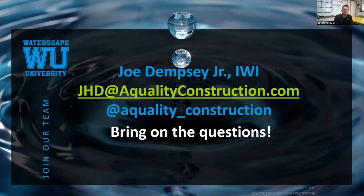Since you guys self-perform most of your work, how difficult are jobs like this to take on when it takes up so many resources? We're booked out basically 12 months in advance all the time. So my biggest thing is controlled growth. We never over promise. We try not to oversell. But when I know I'm going to build this pool, then I basically just block out 6 weeks for the majority of our company. We have guys that specialize just in plumbing. We have guys that just do our tile. We have two crews that just do front end, and both of our front end crews come together for this one. And if there's no tile to do, no plumbing to do, our two managers in both of those areas could also run a front end job. So they join and they just kick it together. So it's all about planning and knowing what we're capable of, making sure that we're not oversold.